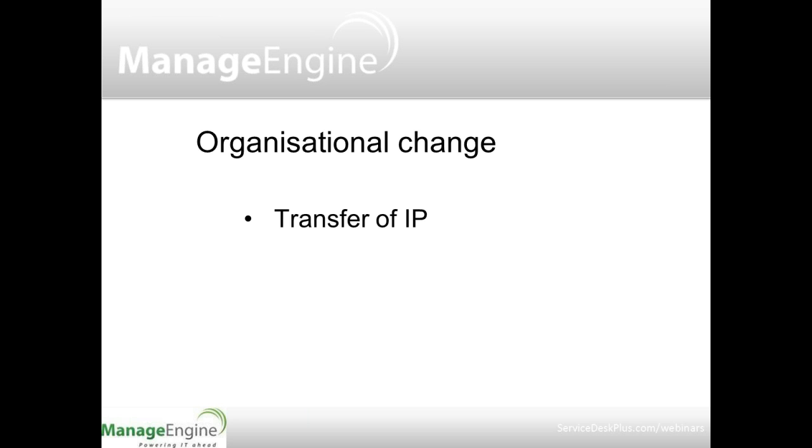So normally one of the best ways to do this, and one of the most common ways, is to make sure that operational people from IT operations and from the service desk are actually involved in the project and work on the project for some of the time to pick up this knowledge and help the transition, and then return them to the production teams. And then we also want to have more formal transfer of IP through documentation and supporting information and so on.